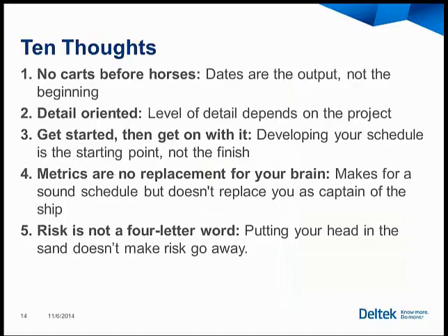So S1 is the schedule development. Don't key the dates in. Some scheduling software will let you just type dates in. Don't do it. Use the relationship and predecessor-successor logic that's available to you in the scheduling tool to do this. Some tools enforce this better than others, but if it's a CPM-based scheduling tool, it allows you to add predecessor and successor logic. That's what you should be leaning on.